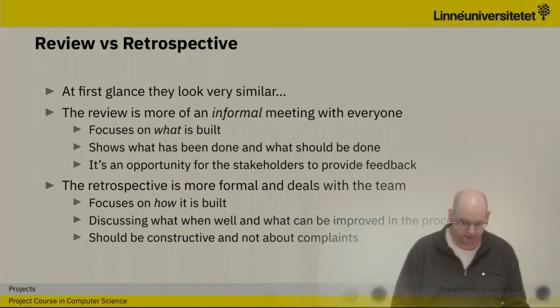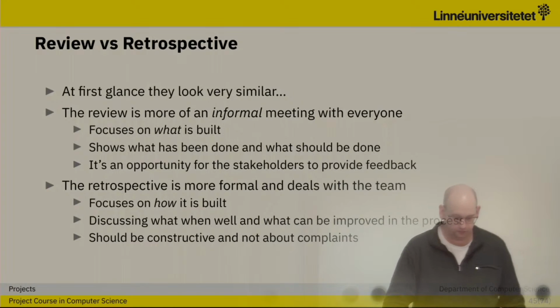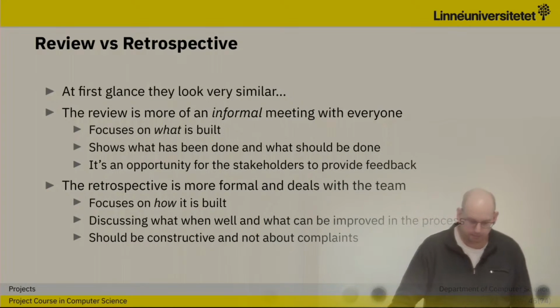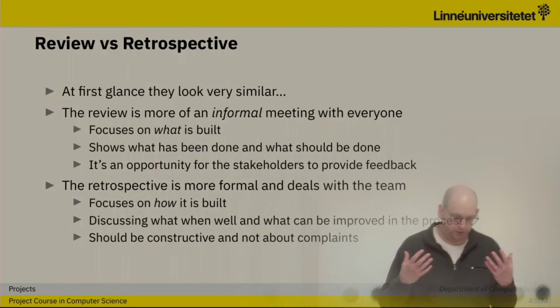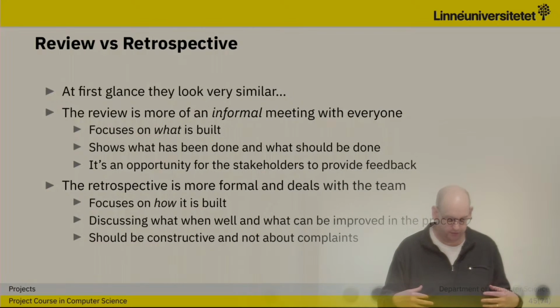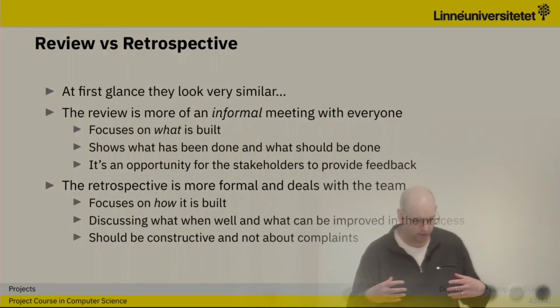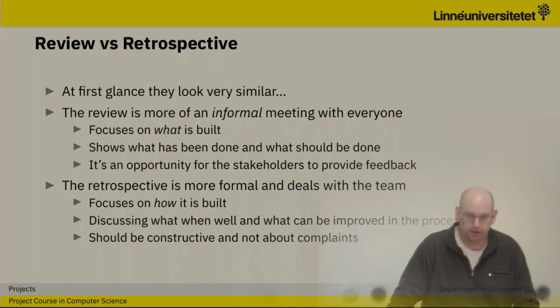And at first glance, the review and retrospective look very, very similar. But the difference is that the review is a more informal meeting, while the retrospective is more formal, and the review focuses on what is built, while the retrospective focuses on how it is built.